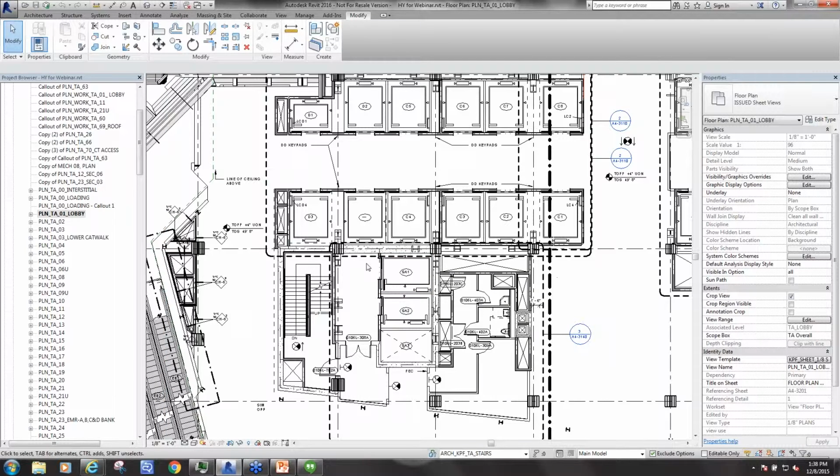From elevator consultant through design team to Microdesk consultant, there is a series of very well documented questions, so that when the team says we have an elevator change, the team already knows the information needed: where does it stop? Are we showing active? Are we showing bypass? What's our door configuration? What's our overrun configuration? What's our bypass configuration?